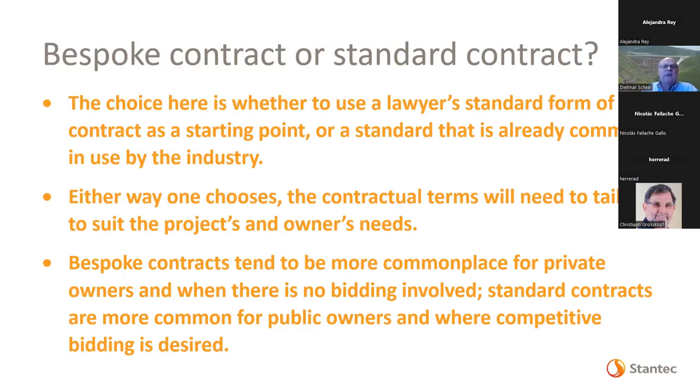So even though I mentioned earlier a lawyer drafted contract may sound custom, basically all contracts end up being customized to the project. A third bullet point there, bespoke contracts tend to be more commonplace for private owners and when there's no bidding involved. Standard contracts are more common for public owners and where competitive bidding is desired.